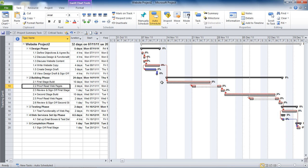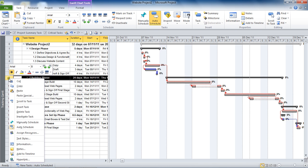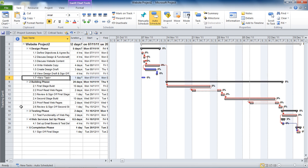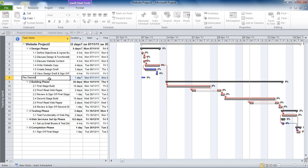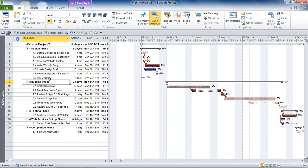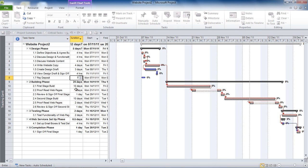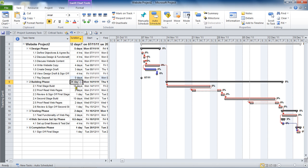So if I was going to add a milestone task at the end of the design phase here, I could right-click on task 8 and insert a task to insert a normal task above it, then enter 'Pay Deposit' as the name. I'll pop into the duration field for Pay Deposit and put it at zero days — and that's it, that is adding a milestone. I can see the milestone in the Gantt chart here, the diamond symbol representing the milestone task and the date after it.